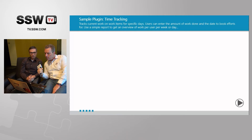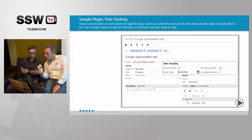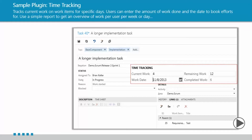The first sample is the time tracking plugin. TFS lacks the ability to book hours on a distinct date and time — if you fill in the remaining work or completed work fields, it books for today. This plugin does time tracking using a custom field. You type in the current work field, you're presented with a work date field, and you can change the date, click save, and the plugin takes care of adapting remaining work and completed work.